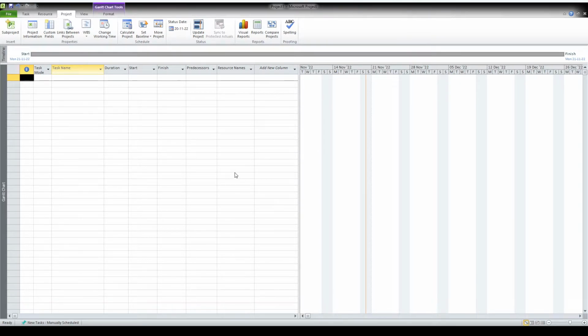So I am clicking work weeks. Then I'm clicking details. I'm just setting Monday to Saturday. Here we have 8 hours: 8 to 12, 13 to 17. You can change the hours. So it will become an 8 hour working day, or if you want 10 hours, you can make it accordingly here. Then I'm applying it. You can see this gray portion has become white, so this became a working day. It is very important to set and customize the calendar so that the program will be adjusted accordingly.